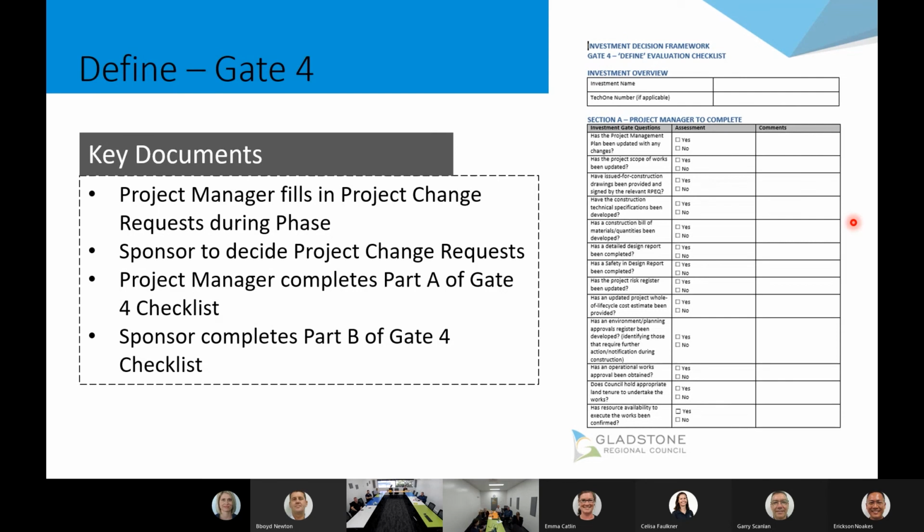And typically, if we talk 80-20, this is the last point you've got to say, no, I'm not going to proceed with this project. There are other outs, like when we get the contract back, we might procure for execution and go, holy dooly, this is $10 million, not $2 million. And that might be a point still, I guess, we can reconsider. But in terms of the formal decision gates, this is what we consider a final investment decision. And this is where final funds approval comes through as well? I'll talk budget in a second. Okay. Yeah.